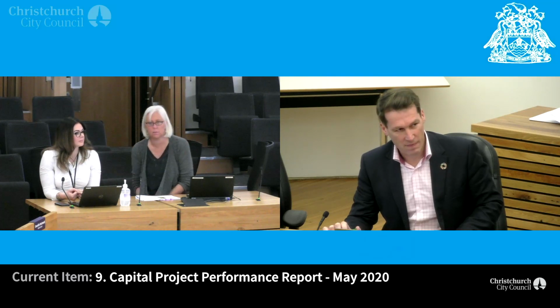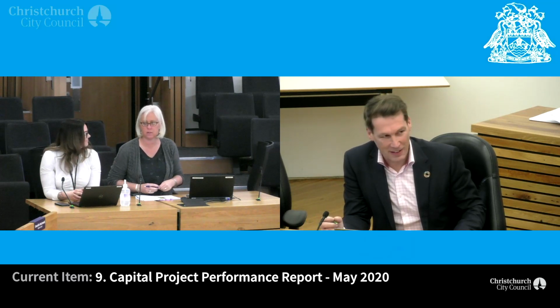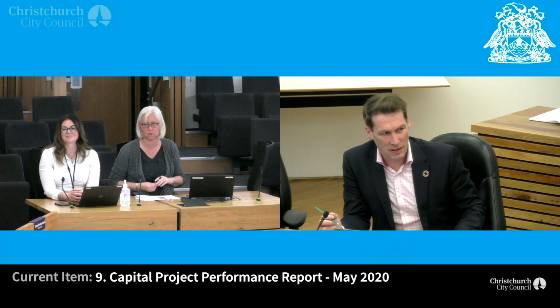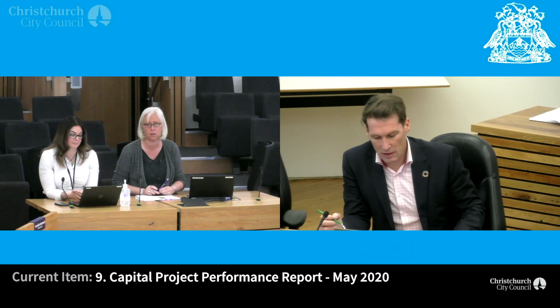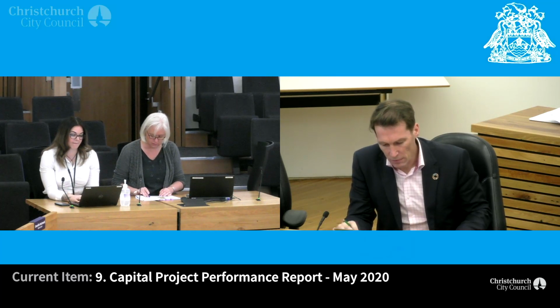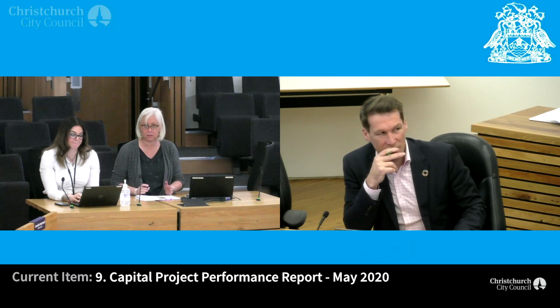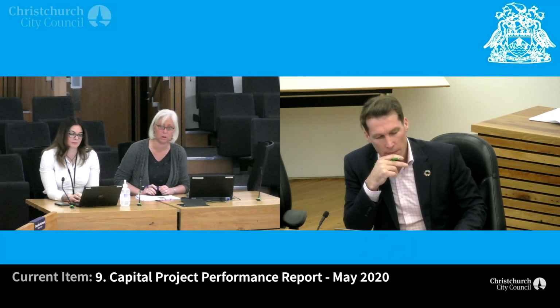Generally, when we start digging up the road, it's more congested underneath than it is on top. So whenever we have to start dealing with service clashes, or we have to start adjusting services, it becomes a risk. So it's often a risk. We do as much as we can to pothole it and address that ahead of time, but the services aren't always where we think they are when we open the road up. Okay. So from Main North Road's perspective, it does remain a risk, but it is being well managed. They are potholing ahead to try and address it. And they're progressing well now.